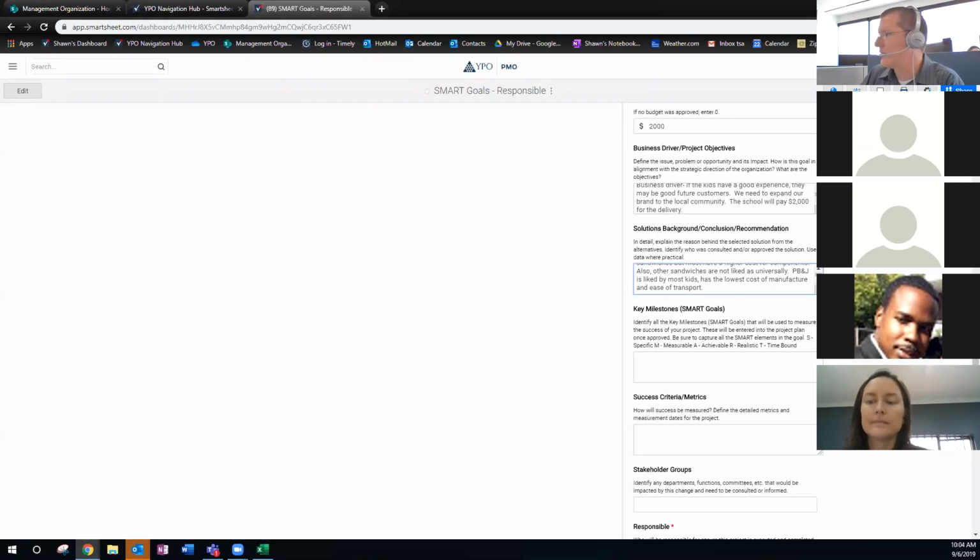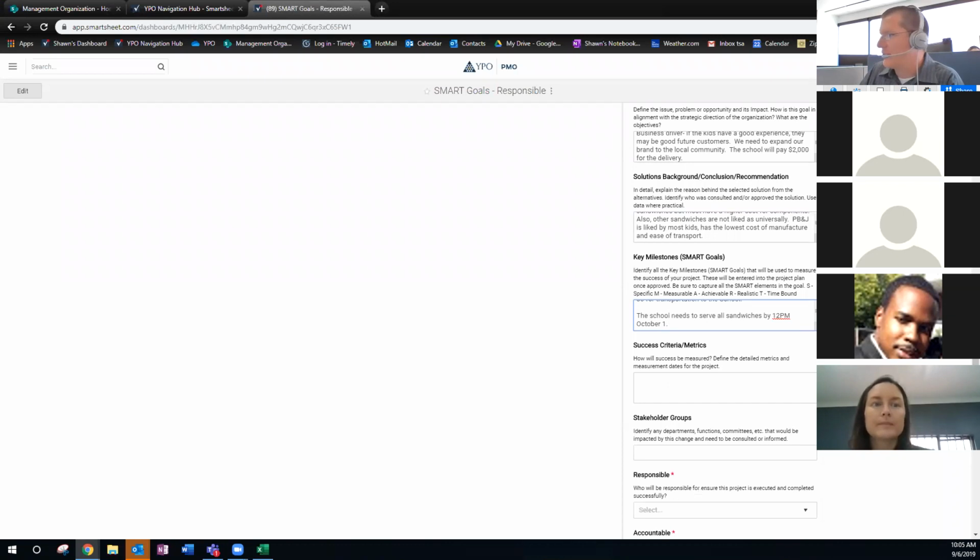For key milestones for this particular project, I've got two. Manufacturing needs to be complete by 10 p.m. September 30th for transport to the school. And then the school needs to serve all sandwiches by 12 p.m. October 1st. So we have some constraints, but those are milestones that we need to hit. And then our success criteria: how are we going to measure whether we're successful?